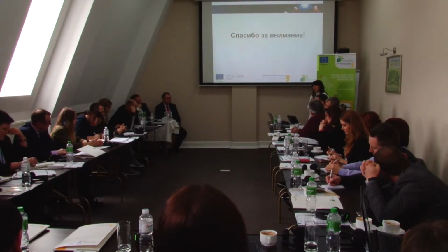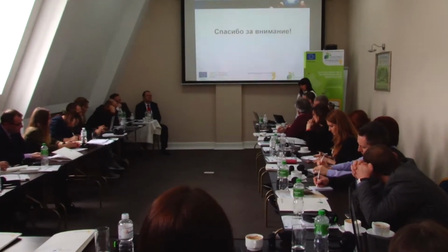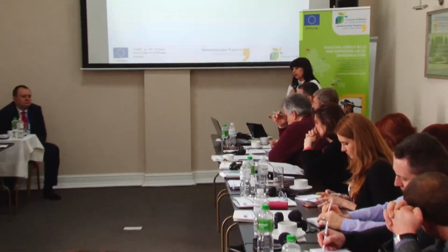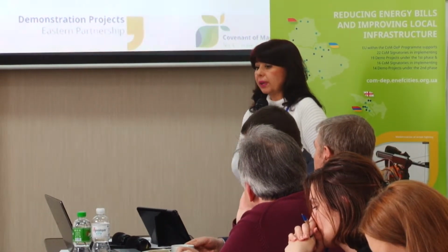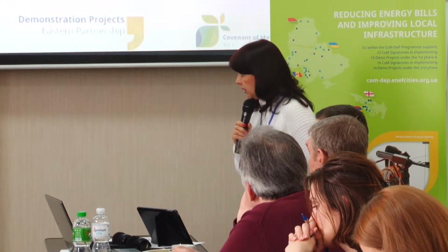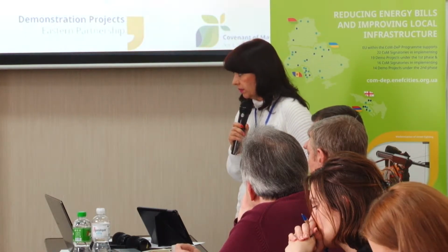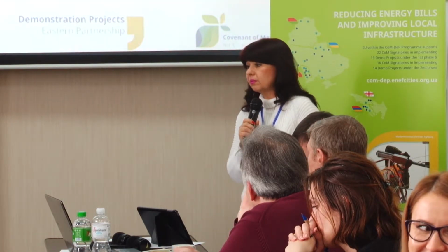On some other aspects, the designing fee, then stages like development of technical designs, coordination of these documents with the support team. If you include those stages, the designer will get the money depending on the works he has already done. With us, it was the case. He developed technical design, he coordinated it, he got the money. The examination was made, he got the money.